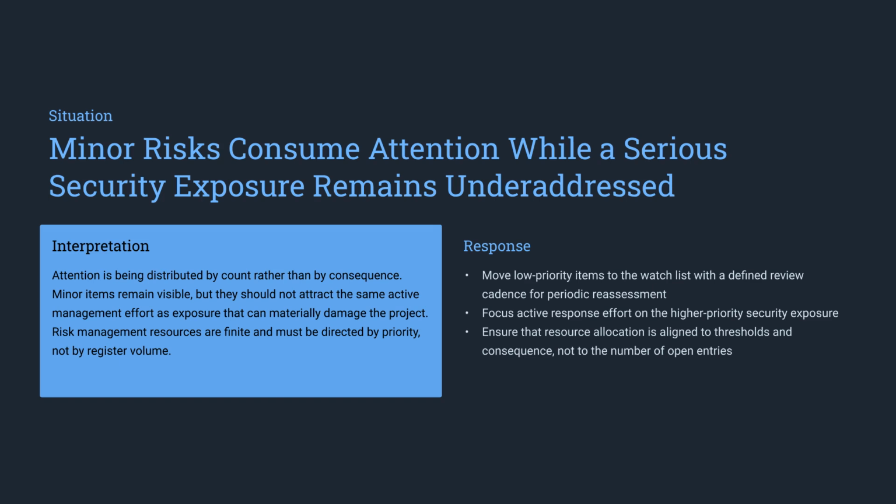Avoid the trap of letting minor risks clutter your management attention. Important security exposures can be overlooked when you focus on the volume of entries rather than their actual consequence. Shift low-priority items to a watch list and focus your effort on material threats.